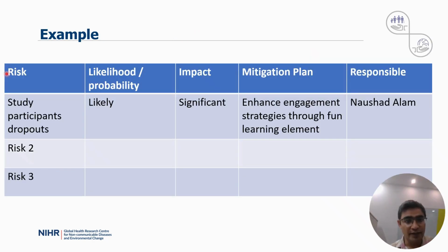To identify a risk, a basic Excel sheet works well here. Use columns like risk, likelihood or probability, the impact, the mitigation plan, and the responsible person.